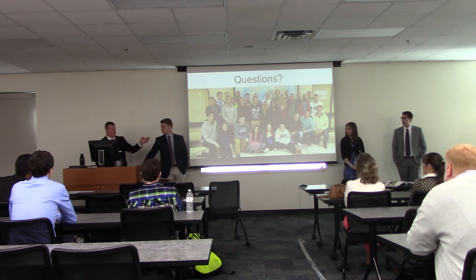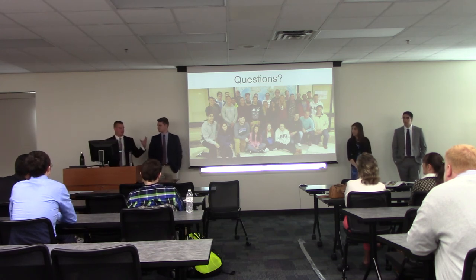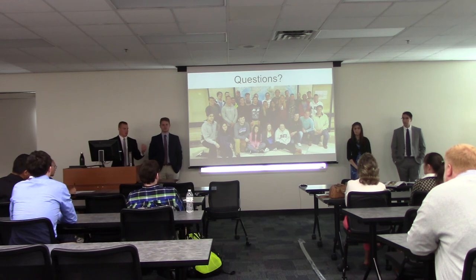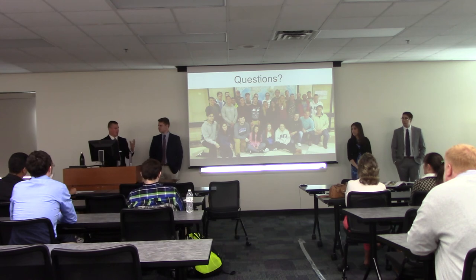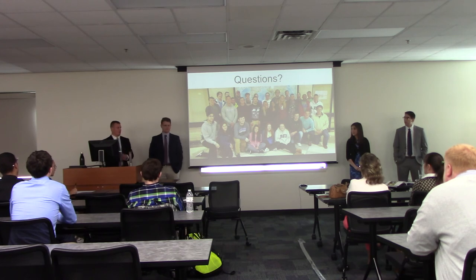Right. I was just going to say what Nick said with the communication, because we were mostly utilizing group messaging, and there was no connection between all of them, besides those weekly meetings, which for all intents and purposes did end up working. But it was kind of hard throughout the week to get everybody's input on things, especially when things started really getting going in the spring semester. So maybe implement a full CWC team meeting mid to end week would be something to look into for the next trial.